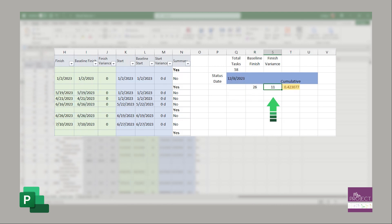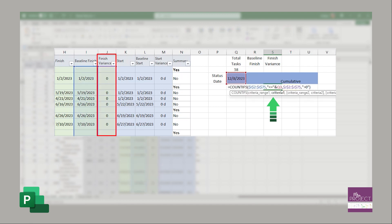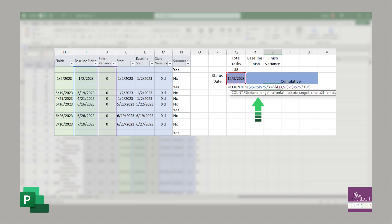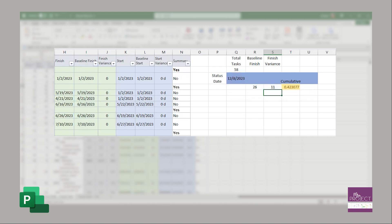Then I did the same thing on the count if for the finish variance, but this is an addition to, so it's a COUNTIFS. We're going to count how many of those 26 - so we still have to get the 26 first, and then how many of those have a finish variance that's greater than zero. So that's the formula, and that's where we got the 11. Then you just have your formula that says 11 divided by 26, and that's where we got the 42%.